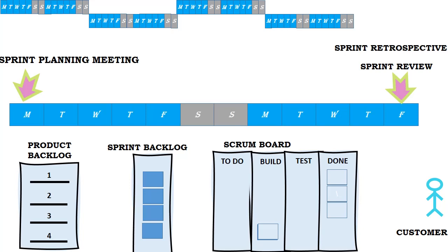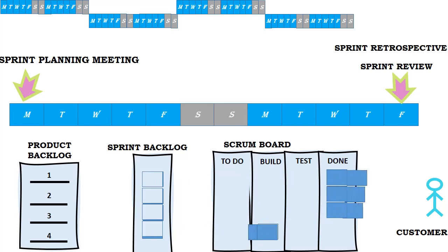Backlog preparation. The backlog is the ordered list of all the work presented in story form for a team. There is no need to create all of the stories for the entire project before the work starts, only enough to understand the first release and then sufficient items for the next iteration. Product owners might produce a product roadmap to show the anticipated sequence of deliverables over time.